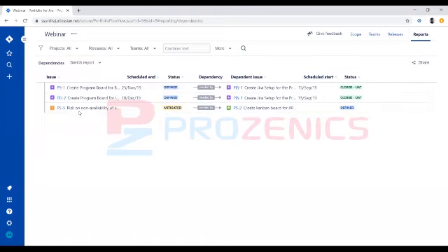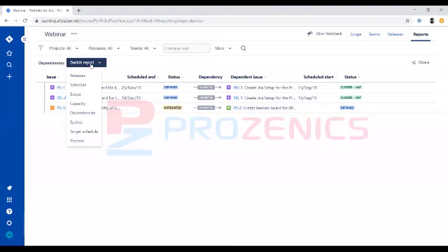And the most important thing is dependency mapping. Jira shows you the dependent epics and any other dependent issue types that we have. So this is one of the most important things. At the portfolio planning level, we need to first understand from the different teams what are all the dependencies that the team has with the other teams, or as product planning, what are all the dependencies that we may need to uncover during our PI planning or some other kind of large-session plannings.